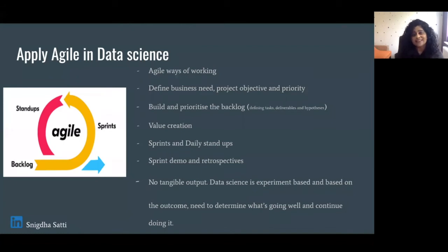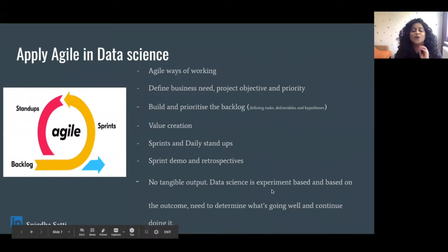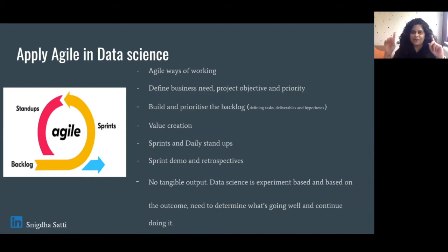And the other thing that was, I would say, the most important thing was having planning sessions. Sorry, I meant to say not sprints, the planning sessions here. So by having a planning session, they had a set goal for the next 2 or 3 weeks, and they knew exactly what to work on instead of getting bombarded by so many other tasks from everywhere else.